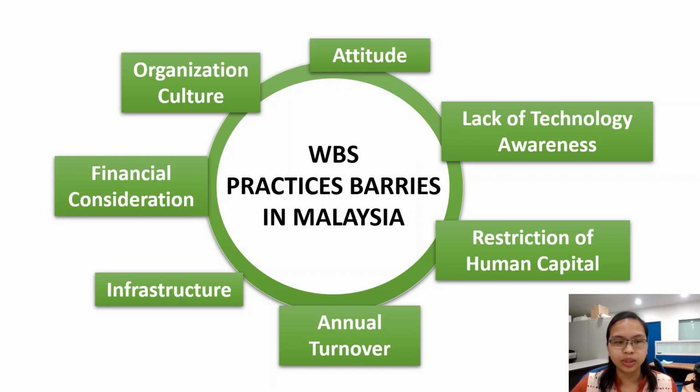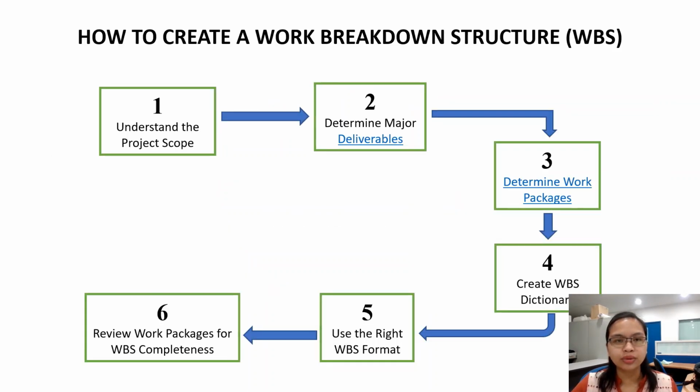Next, I will present how to create a simple work breakdown structure or WBS. The first one, we must understand the full project scope and objective. The project scope statement assists us in fully comprehending the project scope. Second, we must determine the major deliverables.